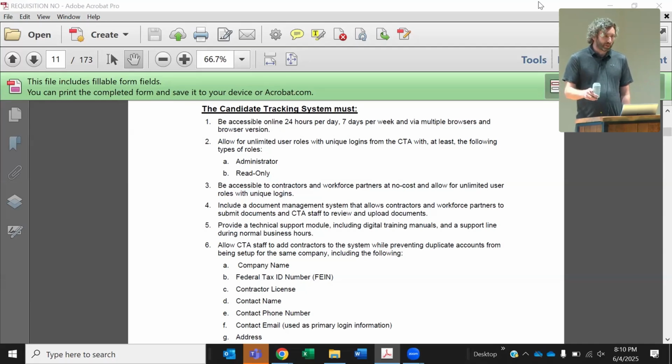Oh, one thing I forgot to mention about the proposal, it does come with a 5-year service agreement. So there is kind of a long-term commitment. You get your main deliverables out the first year, you get it stood up, you go live, and then you've got to service the APIs and security fixes and bug fixes for the next 5 years. So that was actually a risk exposure spot for the firm. They did have a little bit of caution with that.